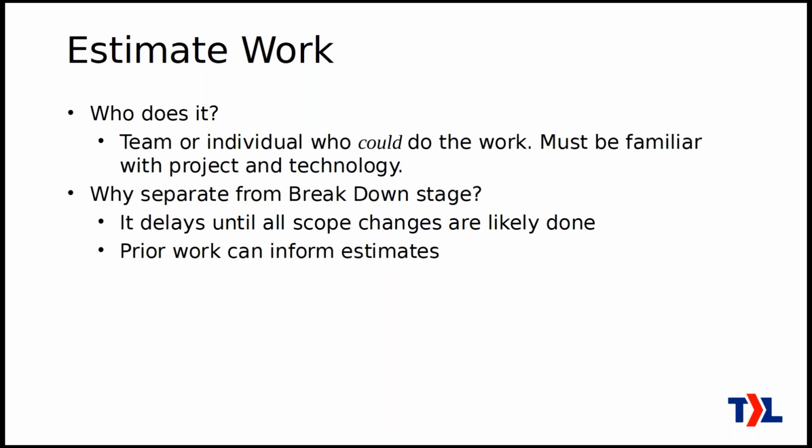Now you might be asking, why would you separate this from the breakdown stage if it could be the same people doing it? Well, mainly one reason: it delays this work until all the scope changes are probably done. Because for some of the work, by the time you do the estimation work for some tickets, you've probably already completed work for earlier tickets in the project.